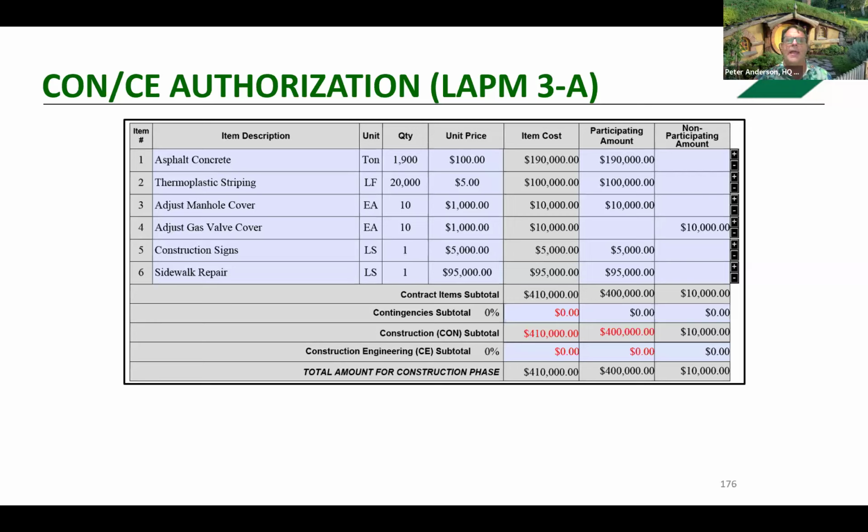You'll have to do an E76 to do a cost award adjustment, for example, and then once FHWA approves that, it's eligible from that point forward. So you may miss out on 2-3 months of CE costs that could have been covered.